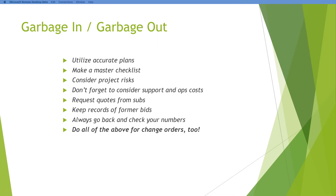The basic things that they're going to need to be able to estimate well are materials, labor, equipment, subcontractor, and of course that nebulous 'other.' These are the basic things that we help our clients figure out how to estimate their costs on. And Knowify does all of these really well. The garbage-in, garbage-out principle applies — you can talk this over with your clients as you're helping them understand how to do better estimates.